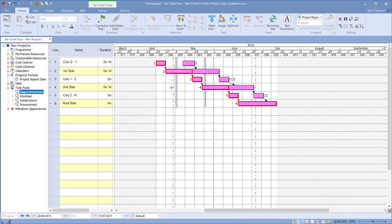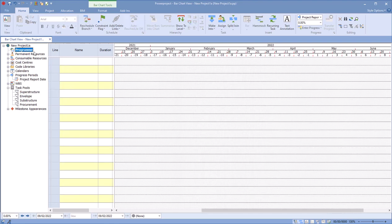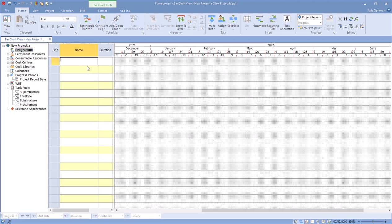They are normal tasks, but these are not part of the project. When you reschedule, when you do resource viewing and histograms, none of these are taken into place. They're in a completely separate area that's nothing to do with the actual project itself. And then when I go back to program, these are the ones that are activities that are in the actual project that are used when rescheduling, resourcing, and costing.